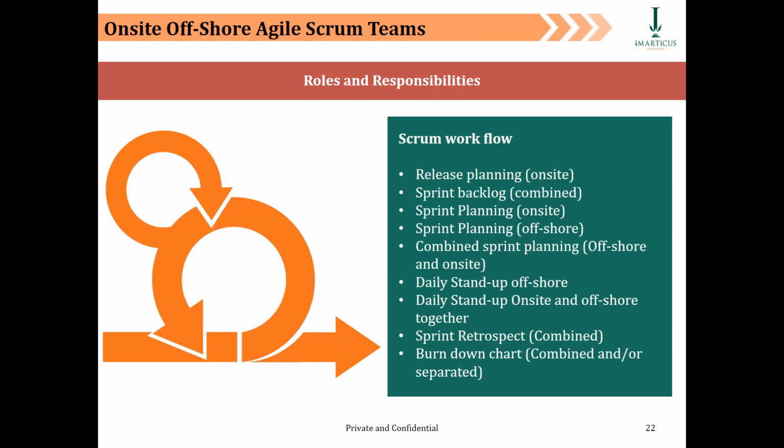Similarly, sprint planning, which is done onshore, has to be done in a joint way with offshore as well, because both onshore and offshore are executors of the actual sprints. Hence, guys, point number 5, sprint planning must be combined. Okay. Now, daily stand-up meetings. They have to be done both onshore and offshore and combined.